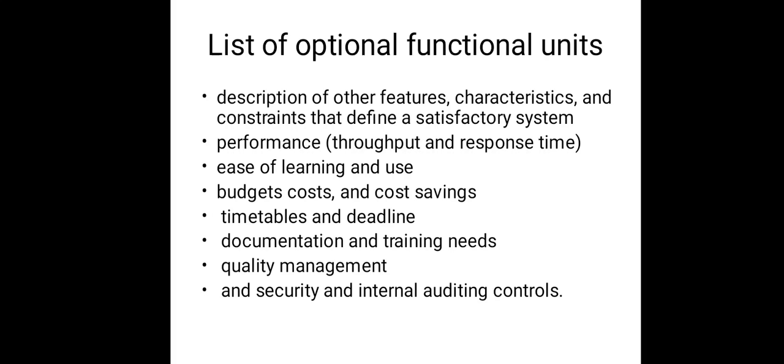Any assumptions you make during the requirements and design process, including the rationale or thought process behind those assumptions. Assumptions may be used to identify related sub-projects or items of work, which are outside the scope of or after this project, and major issues. These issues should be reviewed with the customer at the end of each phase.